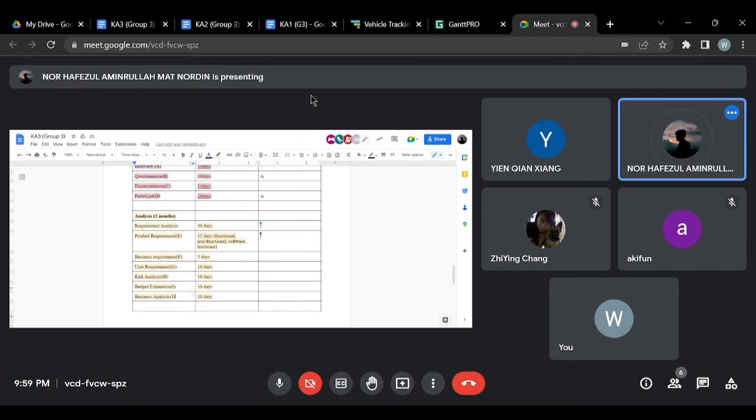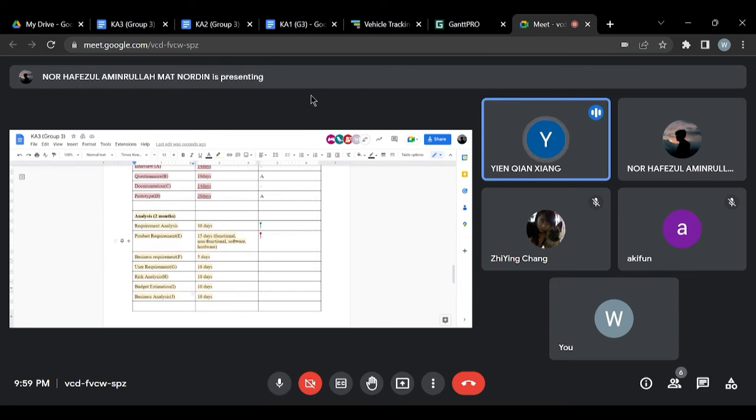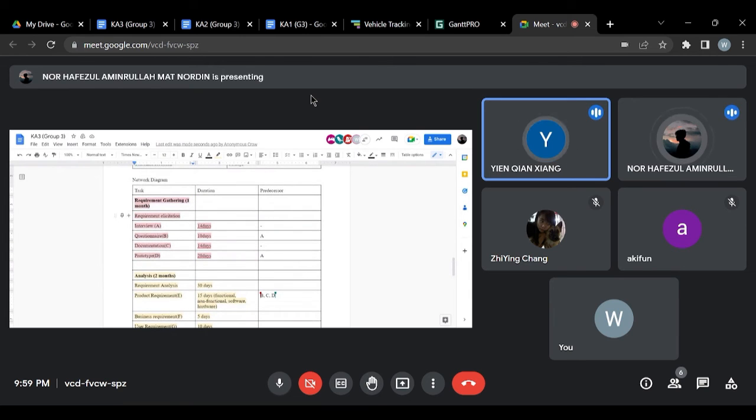Can you repeat? I mean the product requirement depends on our requirement gathering. After all requirement gathering is done, then we can start our product requirement.